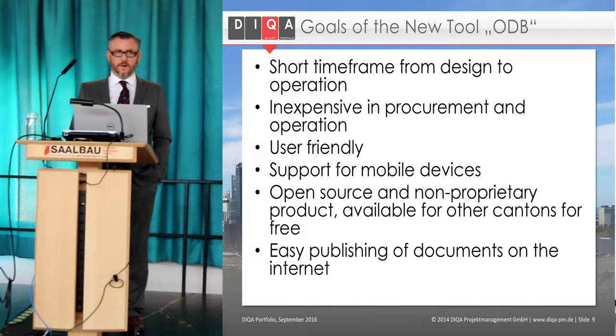We are right now in the second year of the project. This is longer than originally planned for. Reasons for that are that, of course, change requests are coming in, that, for example, users see that things that have been designed in the detailed specification don't work or look like they intended, so we change it. And these are all fairly formal processes. So this takes time. Another goal is that the current number of tools is going to be reduced.